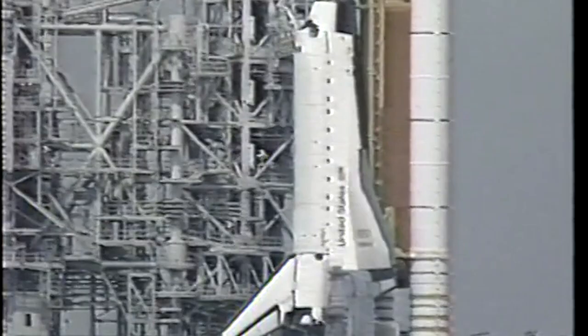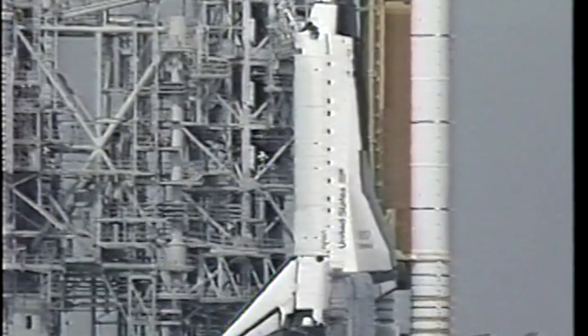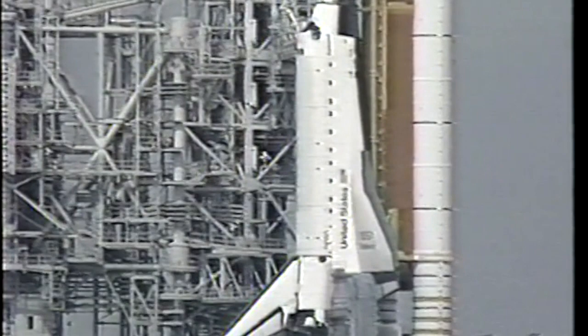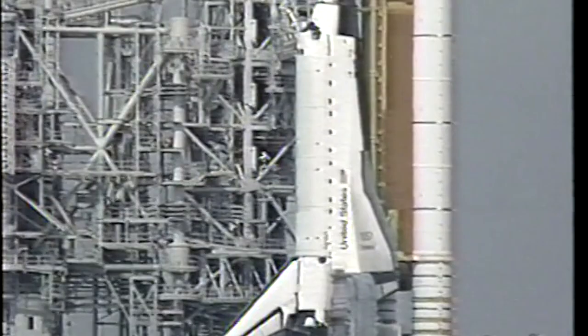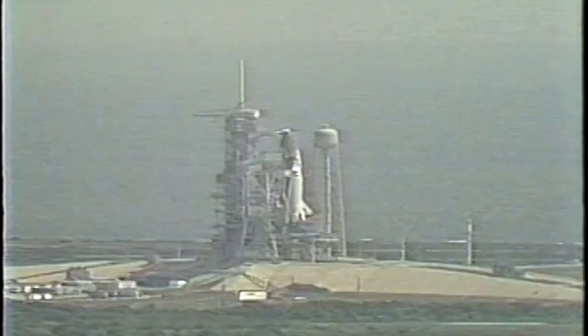And summarize the hardwire spacing issue that came up also, please. Okay, on the fuse that has now blown, there are two hydrogen prepress valves on the hardwire panel that are not functioning. In the event that we were to lose LPS and have to hardwire safe, we would be relying on the third prepress valve to do a hardwire drain if required. And that would be post-FRF. Yeah, I copy post-FRF. Now, the other option to that, of course, would be to go get the fuse replaced with a red crew, inhibit that valve from operating, and then either drain using hardwire or get LPS back up. Okay, I copy.